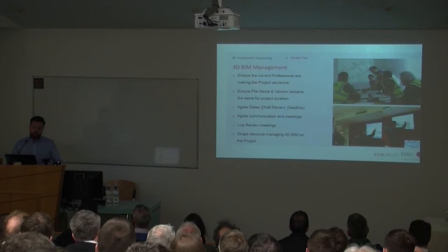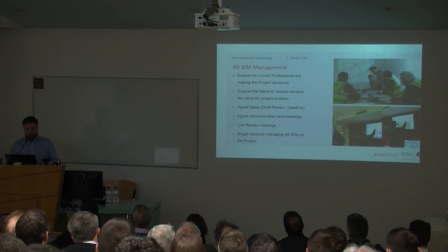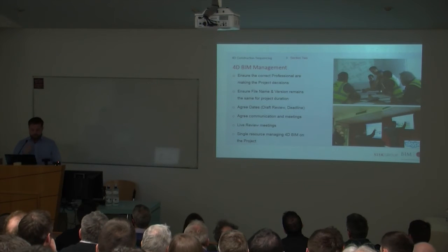So as I said, I'd either go to the contract manager. I said, look, if we're under pressure, just get a couple of A3s, sketch out what way you want to go about building the project, hand them over to me, and at least I can understand how he's going to go about building it. Then some people might mark it up in PowerPoint, but again, if you sketch it out, it's a quick process to get the construction methodology started.